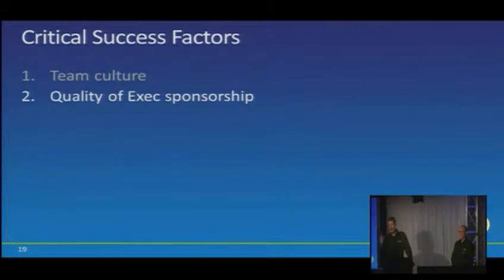Look, I just want to say I have seen so many projects stutter on because of this. There's a former guy I once saw when I worked at Microsoft back when I started in 1995, a guy called Jim McCarthy, and he talked about 21 great rules of software development. And one of the things he said, and he said a lot of great things, is projects slip one day at a time. They slip one day at a time. You don't wake up the next day and find, oh, we've slipped 6 months, unless you haven't had your hand on the pulse. That's true, but also maintain that your relationship with your sponsor slips one day at a time.